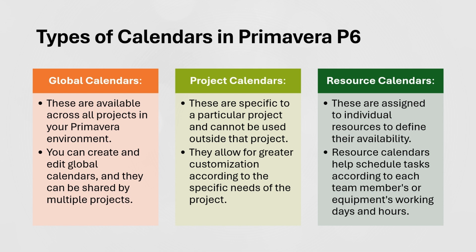A project calendar is specifically for one project, meaning you are working on a project which is different from other projects, and its timetable or work schedule or office timing is different. So you make a project calendar simply for that particular project. We also have a resource calendar, meaning sometimes we don't have resources available all the time. We have resources for a shorter period of time, so we make a resource calendar for when this resource is available to us, so that we can use it in our project.